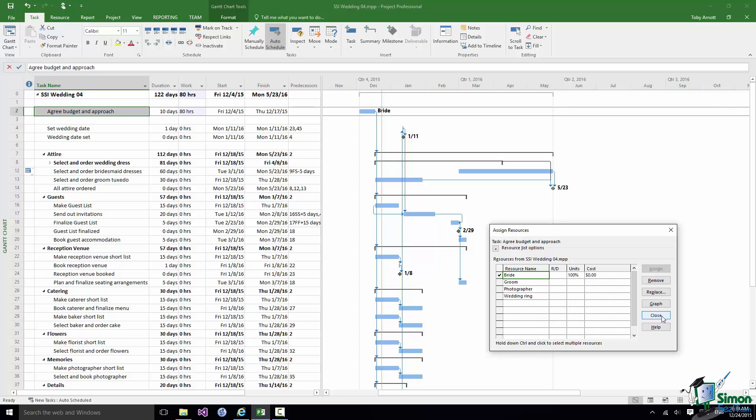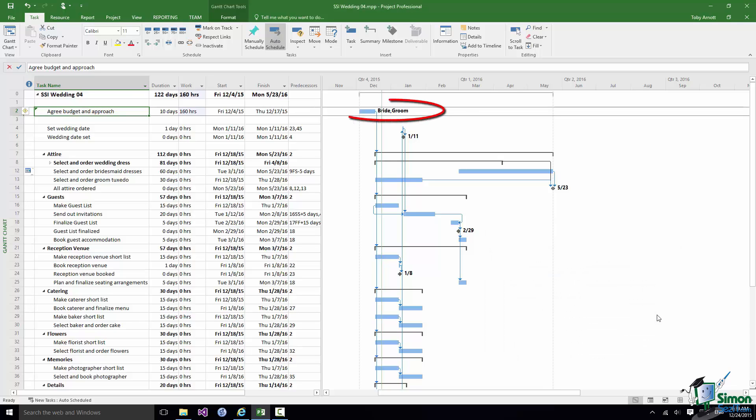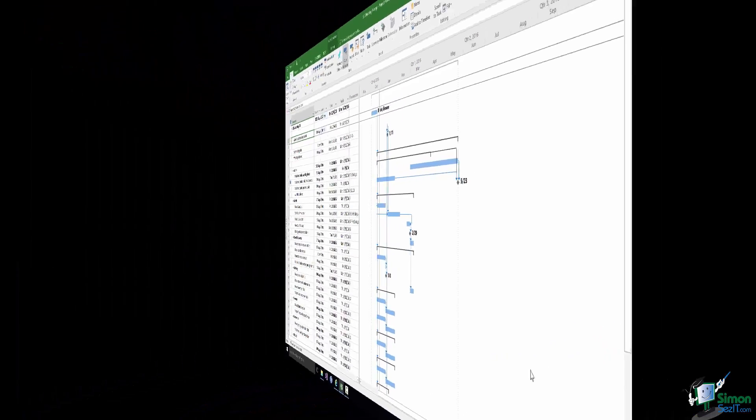Now fortunately while that task is in progress she doesn't actually have any other tasks on the wedding so she can spend all of her time on it. If I want to assign a second resource, and the most obvious second resource to assign is the groom, I'm going to select the groom and do the same thing. Click on Close and the bride and groom are now assigned to that task.